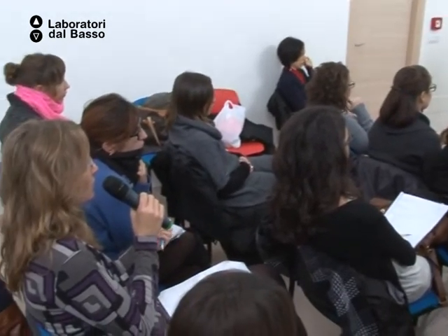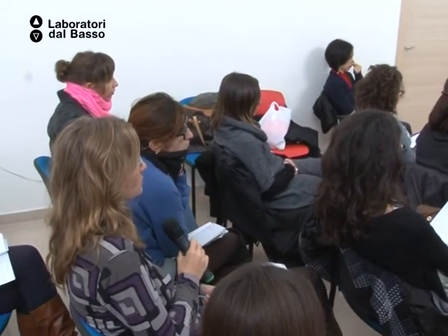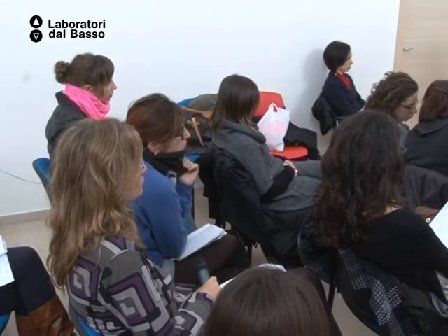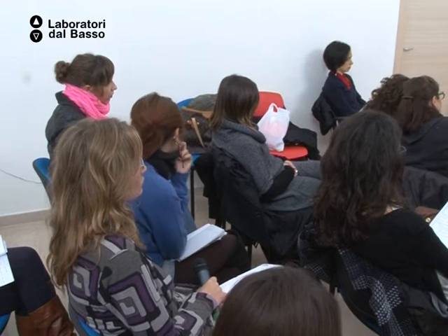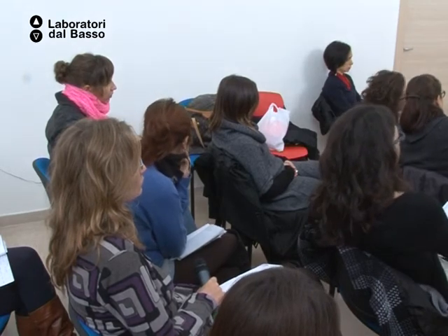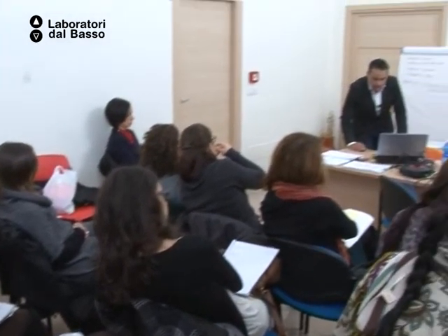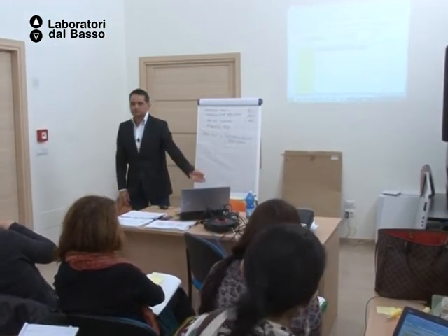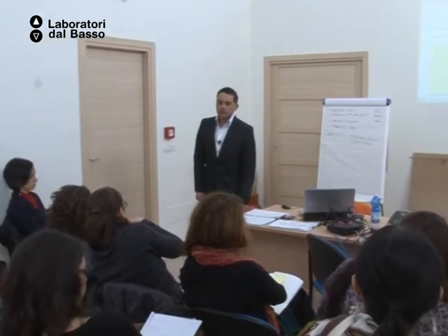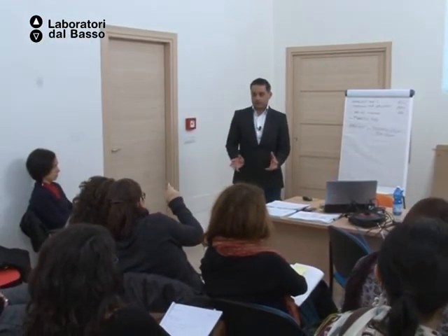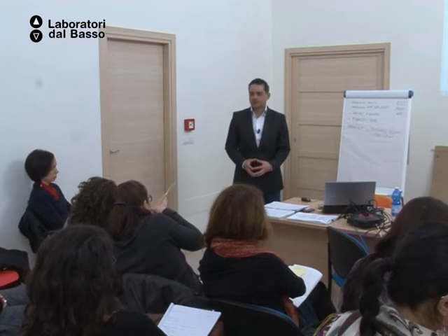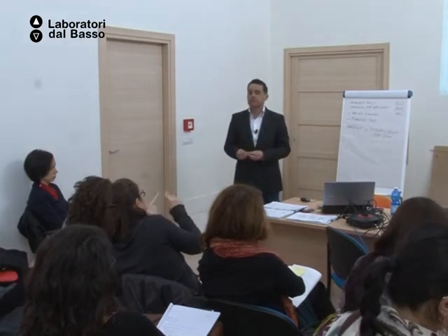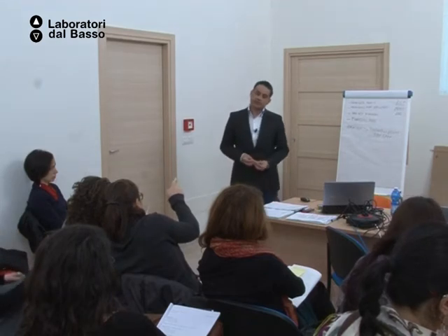So what's a quality plan? What's the point? In all the projects I work on, I have a quality work package. I would say that my quality work package starts at the same time as project management and has a duration of 24 months. That's my way, but it's perfectly acceptable to include the quality activities in the management work package.